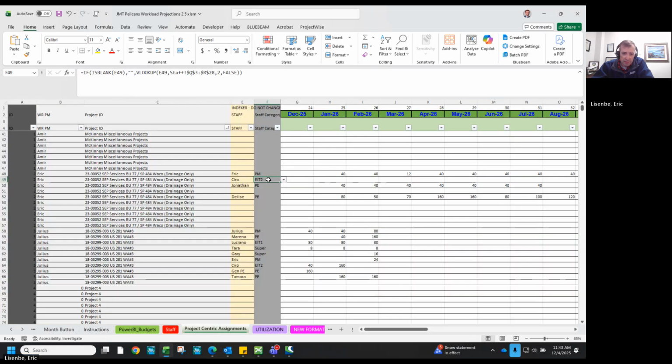So that's been set up to just VLOOKUP. And that will factor in when it's calculating the cost, that the budget cost that's spent for whatever person you assign. So you just go in and assign the staff, or generic staff if you want to use those general numbers like general EIT, general PE, and then assign how many hours you think they're going to work on that project.